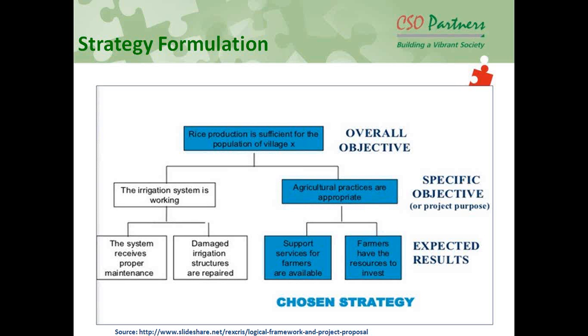It is based on some analysis, some assessment, some comparison, some data you will have to collate, to understand what the trend would be in other places in similar situations, with similar kinds of activities, and then see what the realistic indicator should be. If you set a higher indicator than the realistic standard or the trend, then definitely you cannot achieve that. Or if you put a lower indicator, then you will underachieve in your project.